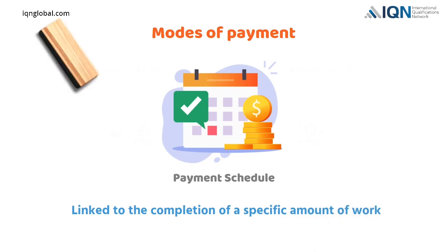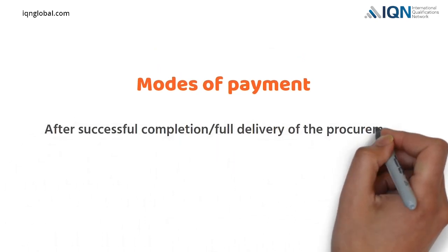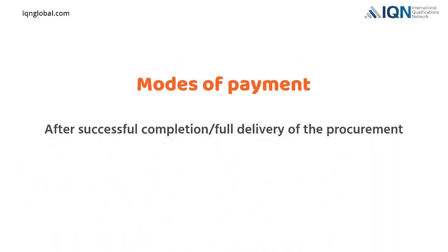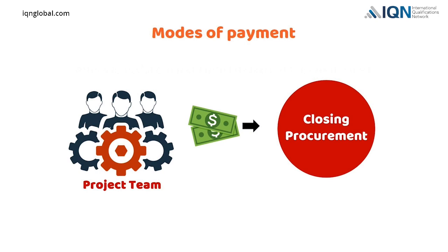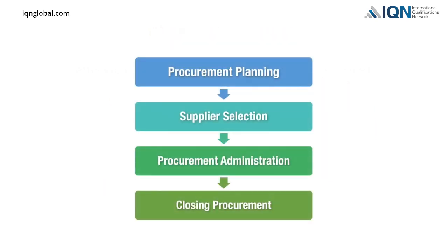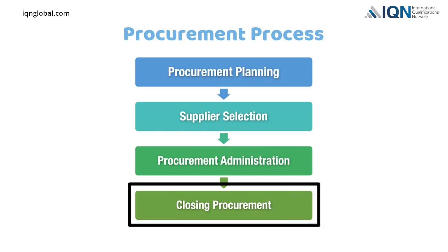Payments can also be made only after successful completion or full delivery of the procurement. In this type of payment mode, the project team settles the payment during closing procurement, which is the final stage of the procurement process. We will discuss closing procurement in the next video.